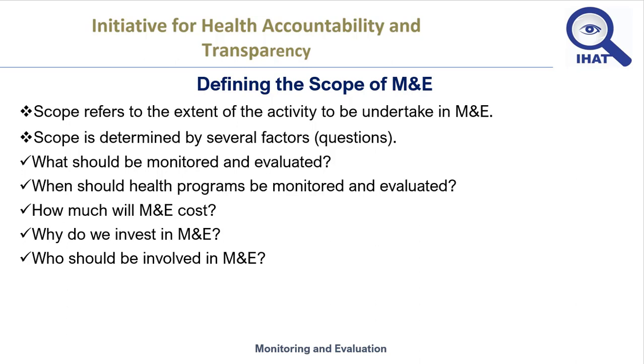If additional resources are available, undertake some form of process evaluation. Outcome evaluation requires a moderate to high level of resources. Impact evaluation requires an even higher level of financial and technical resources. Therefore, budgeting for an MIE effort is an important part of planning. It is also important to understand why we need to invest in MIE. When we invest in MIE, it strengthens program design, improves implementation, justifies allocation of limited resources, and improves use of allocated resources.